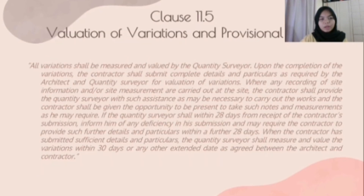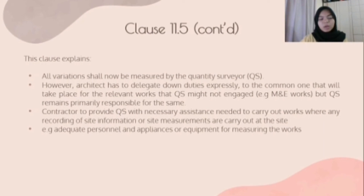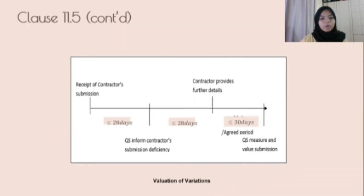Clause 11.5 - Valuation of Variation and Provisional Sum. This clause explains that all variations should now be measured by the QS. However, the architect has to delegate duties expressly to another party that will take place for relevant works that the QS might not be engaged in, such as M&E works, but the QS remains primarily responsible. The contractor must provide the QS with necessary assistance needed to carry out work, including recording of site information or site measurement, such as adequate personnel and equipment for measuring the works. Here is the timeline for valuation of variation.